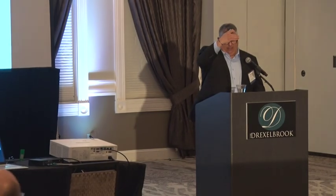One thing we see a lot is with some of the townships, they want to see an HOP permit first before they approve a subdivision plan. And we want just the opposite. We want the township to approve the subdivision plan first, and then for the permittee to apply for their permit. Because a lot of times, if we issue the permit first and the township, in their process, reviews something and says we don't like this, it never gets reflected back. So we ask for the subdivisions to be approved by the townships first, and then the permittee comes in for the state. Thank you, Kenny.